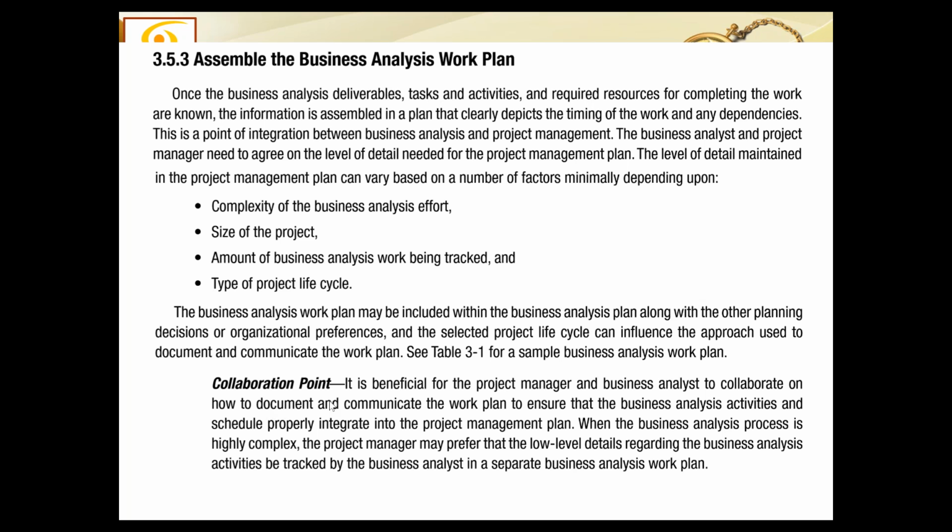So the collaboration point here is it is beneficial for the project manager and the business analyst both to collaborate on how to document and communicate the work plan to ensure that the business analysis activities and schedule properly integrate into a project management plan. When the business analysis process is highly complex, the project manager may prefer that the low-level details regarding the business analysis activities be tracked by the business analyst in a separate business analysis work plan. So this is the collaboration point.